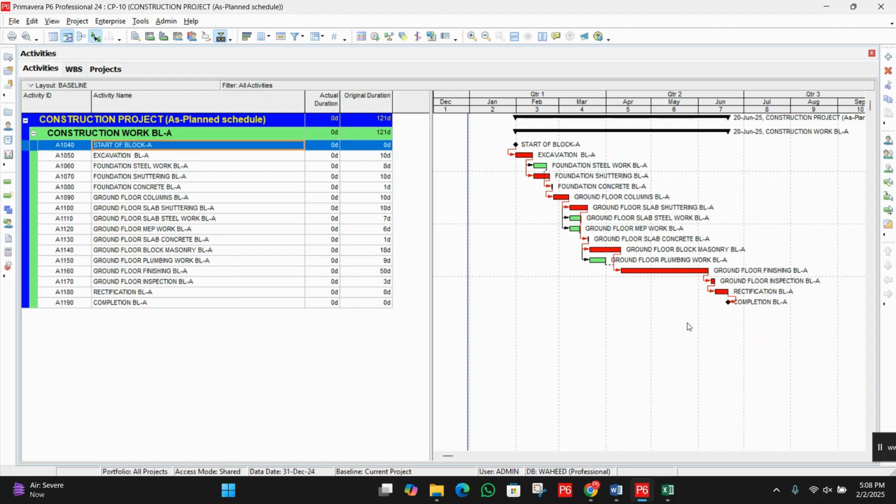Similarly, the analysis could determine the earliest date that the various completion activities could have been achieved but for the contractor-caused non-compensable delays that occurred during the project.